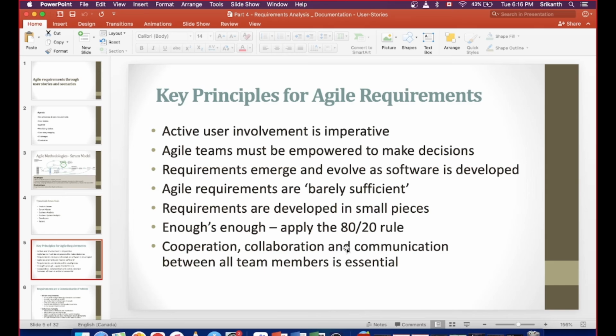If we are taking 4 cards in the sprint, for all the 4 cards the developer should complete the coding, and for all the 4 cards testers should complete the testing, and by the end of the sprint they should be able to deliver those 4 cards. And the BA role acts differently. Let's say the project is in sprint 2; the BA will work in sprint 1 to write the requirements and take the sign off for the stories which are to be developed in sprint 2. So always the business analyst is ahead of developers and QA by one sprint.